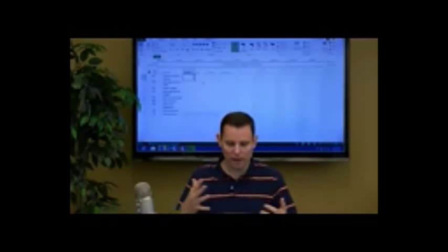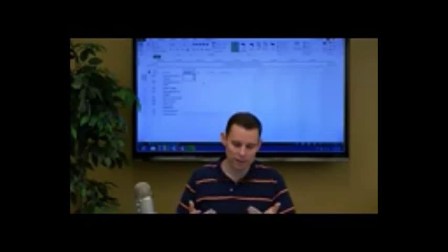So brainstorming ideas and themes, gosh, that probably will take, I don't know, a couple hours. So I'll put 2 hours, question mark there. You don't have to be real serious yet with your duration. You can put little notes and things in here, little estimates. Boss approves the ideas. Oh, he should be able to do that in 2 hours. Draft a budget. I'm pretty good with Excel. I think I could probably get that done in half a day. So I'll just type half a day there. Boss approves the budget. That's probably going to take him 2 hours, just like the other approval task.